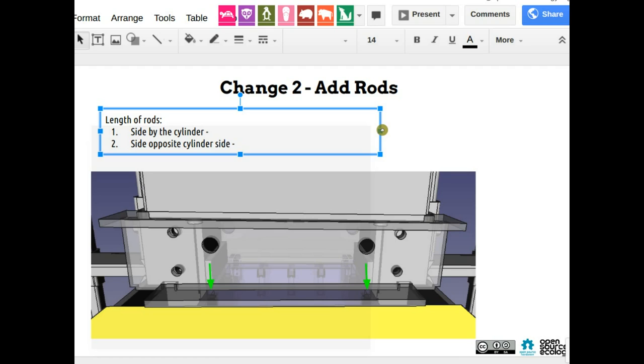And displacing the soil block is something another person is getting rid of. That's Dixon and Joseph. So basically what we're doing is all these steps, and they don't necessarily depend on each other. That's the beauty of parallel workflow: you don't have to wait for one to finish before the other, because there are multiple people doing them right now. That's the way you can compress time. We are just declaring we're going to put it down as far as it can go.